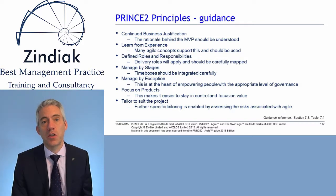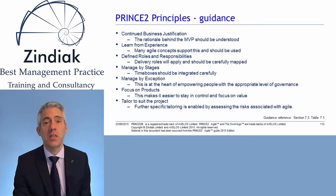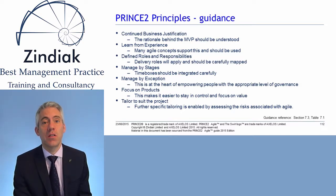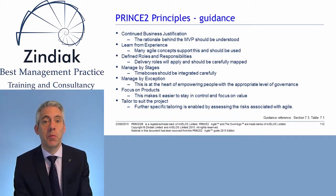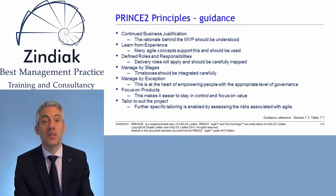On this slide we can see the seven PRINCE2 principles and we have some guidance against each one. Starting with continued business justification: the first thing to note is that Agile often uses the term 'value' rather than 'benefit', but they're synonymous for our purposes. We need to understand the rationale behind the minimum viable products. If the project delivers the minimum viable product and the business doesn't realise any value or benefit, that might indicate there is no continued business justification.